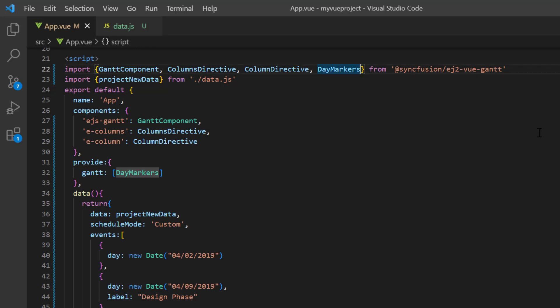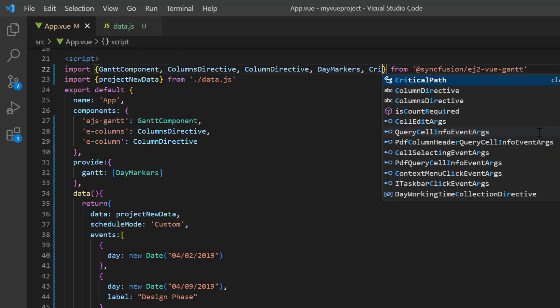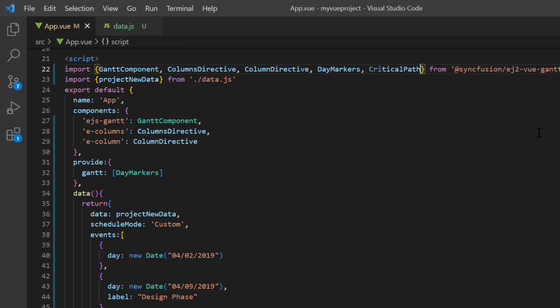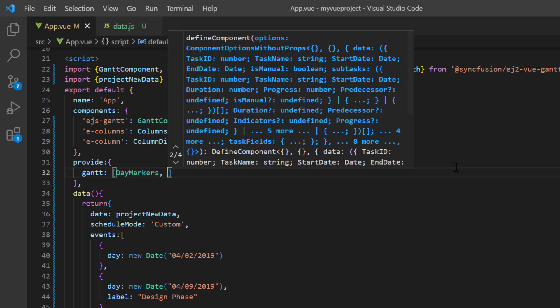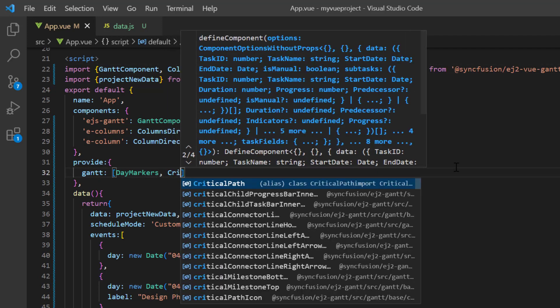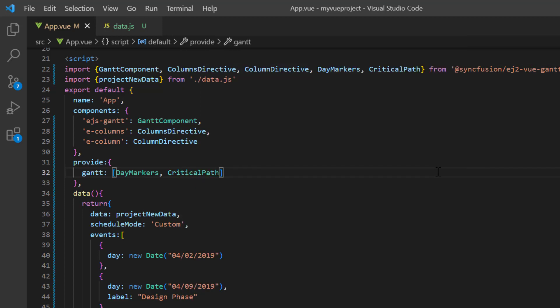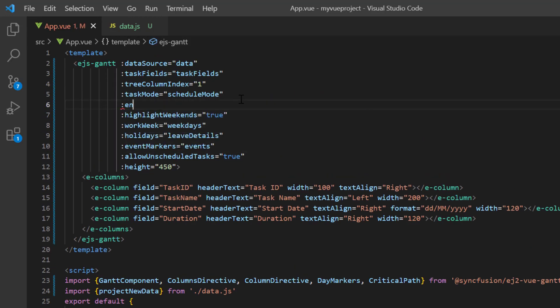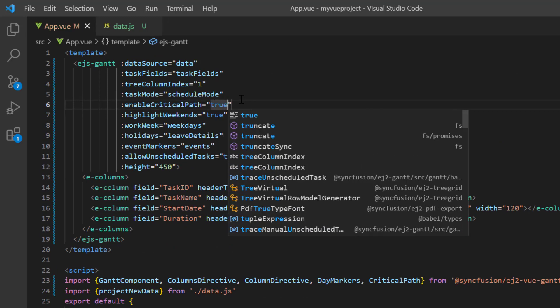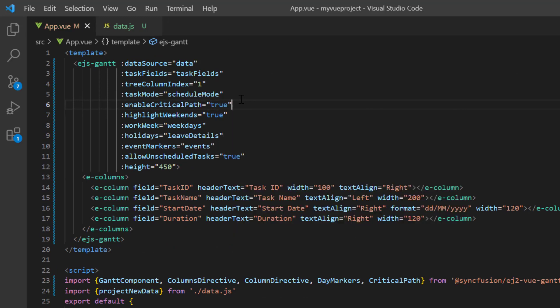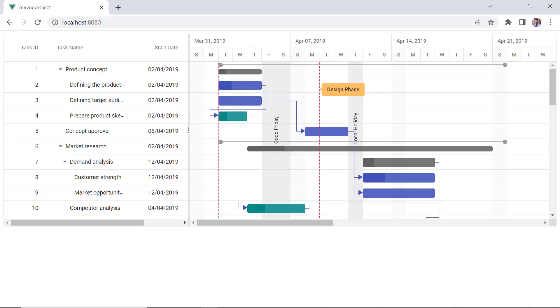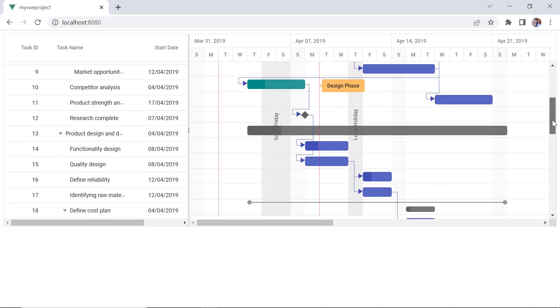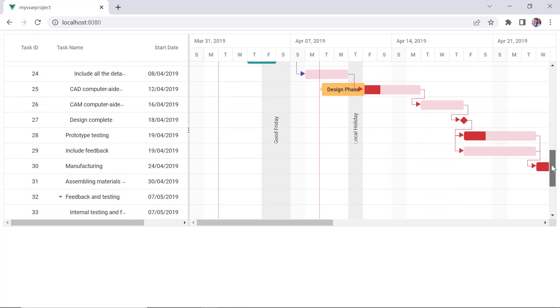To use a critical path, import this module from the Vue Gantt package and inject it into the provide object. Then add the enable critical path property and set its value to true. See the timeline, the critical path is shown.